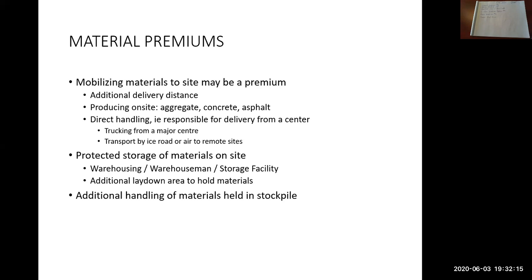So another job that I worked on while I was working near, I guess I should say, was the water treatment plant in North Vancouver, the Seymour water treatment filtration plant. My company did the earthworks there. So the next company that came in that was doing all the concrete work set up a concrete batch plant just a couple kilometers up the road in a gravel pit, and produced their own concrete and trucked it a couple kilometers to the job site, rather than having to drive concrete trucks, you know, 45 minutes or an hour each way in and out of town.